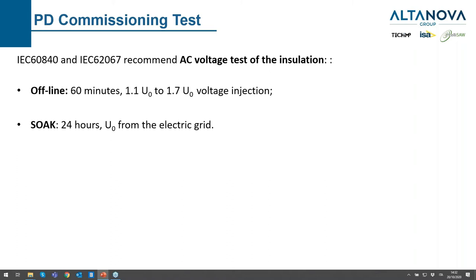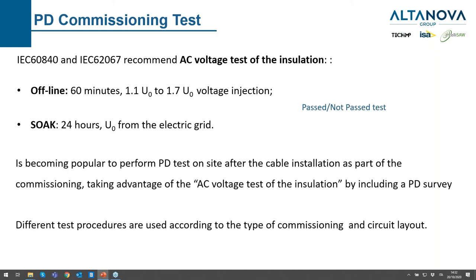The most followed standards for high voltage cable site testing are IEC 60840 and IEC 62067. After laying the cable, we have to perform tests to prove that the insulation is okay. An offline test is a 60-minute voltage injection where we inject from 1.1 up to 1.7 times the rated voltage. Another solution is the soak test, where we keep the cable for 24 hours at normal voltage by connecting it to the grid — a pass or not-pass test. Nowadays, it is becoming popular to perform PD tests on site as part of commissioning, including a PD survey within the AC test.